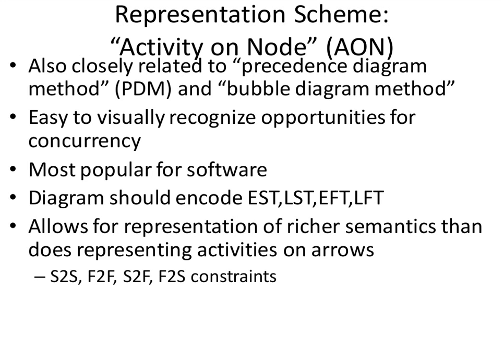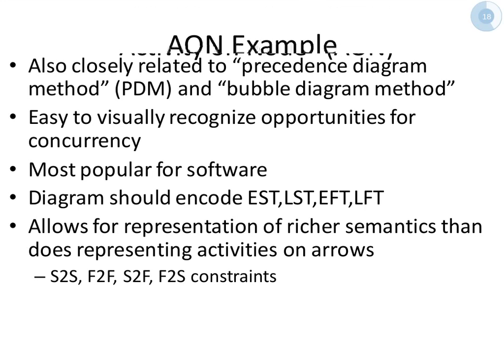For our case, the early start and the early finish are going to be trivially related to one another, by the early finish just being the duration of the activity plus the early start. So if we have the early start and the late start, we know by just adding the durations that we can get the early finish and the late finish times.